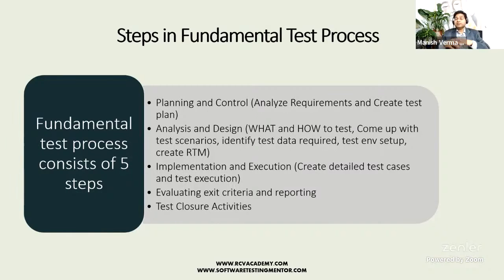Apart from that, the team can decide what all bullet points need to be fulfilled. So no severity 1 and 2 defects should be open before we can say yes, testing is complete or we have exited this phase. Okay, so this exit criteria is flexible, decided by the team. There are a few things that are decided by the stakeholders, but there are many things that are decided by the team together to ensure that they are delivering a good quality product with each iteration.